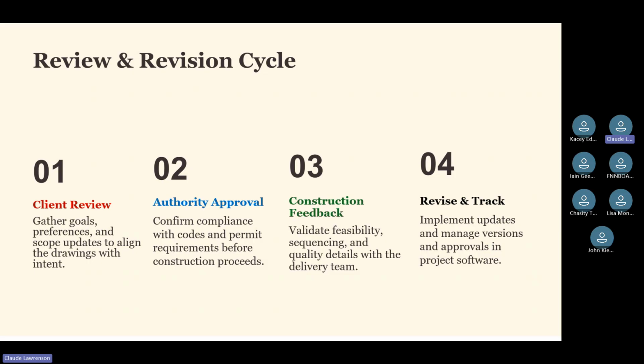We also take a look at construction feedback. So often we would go to a local builder that we've known to try and get some feedback. So validate the feasibility. Is our estimated cost going to be within a reasonable approach of what a builder would think it would cost that particular builder to build? So we kind of get some preliminary cost estimates to make sure that it's falling within the, we'll call it the budget that the client had projected as part of their cost to build this.